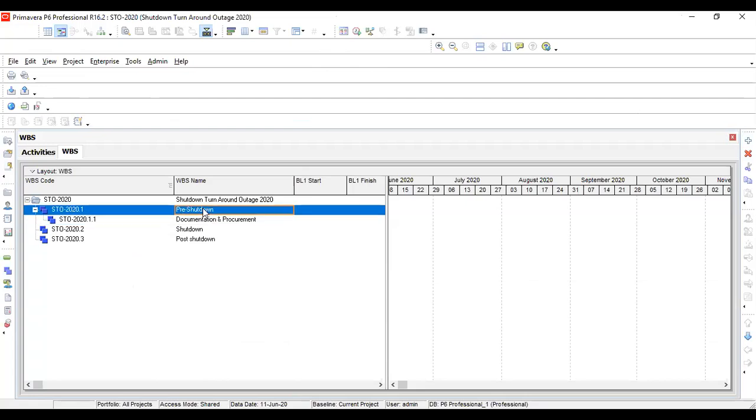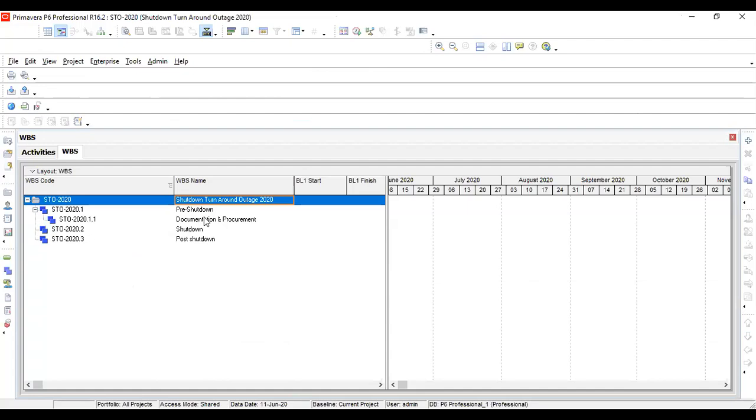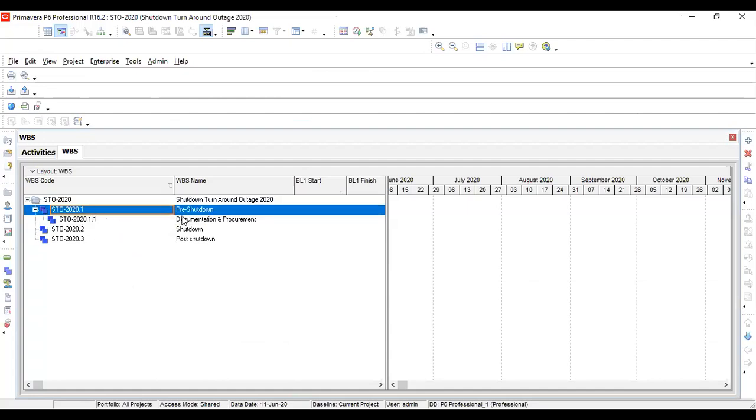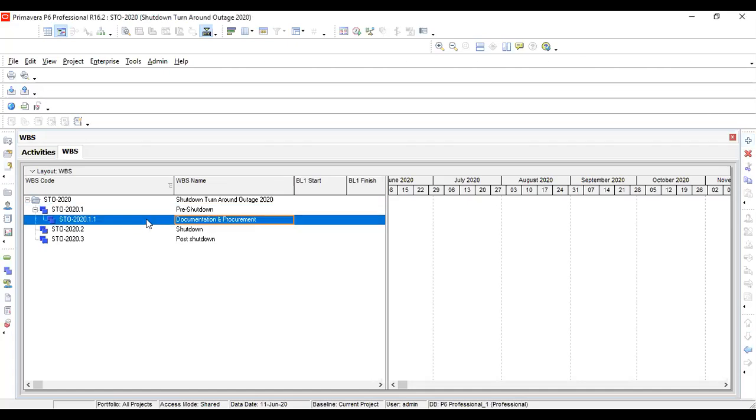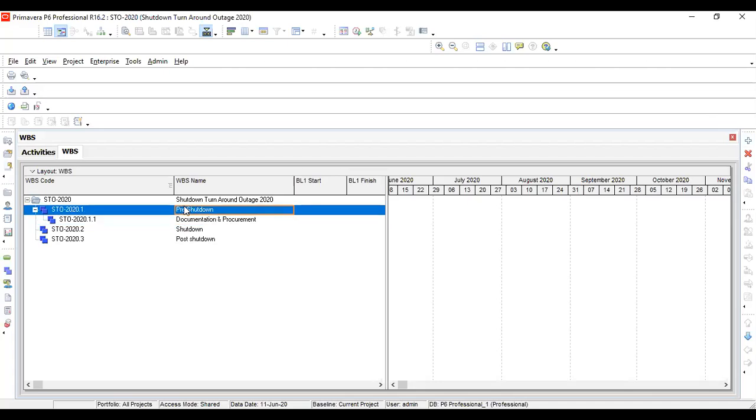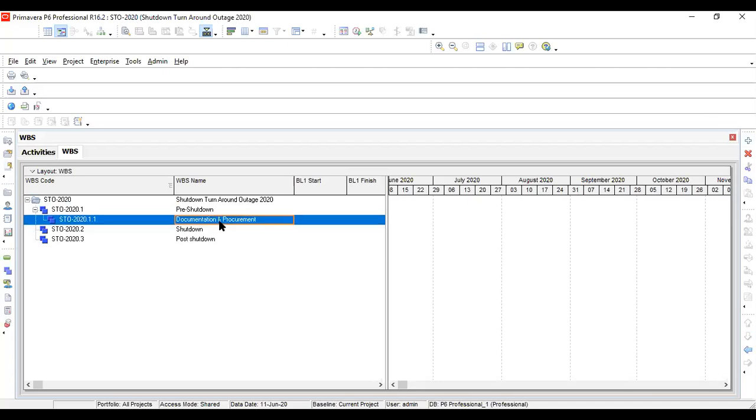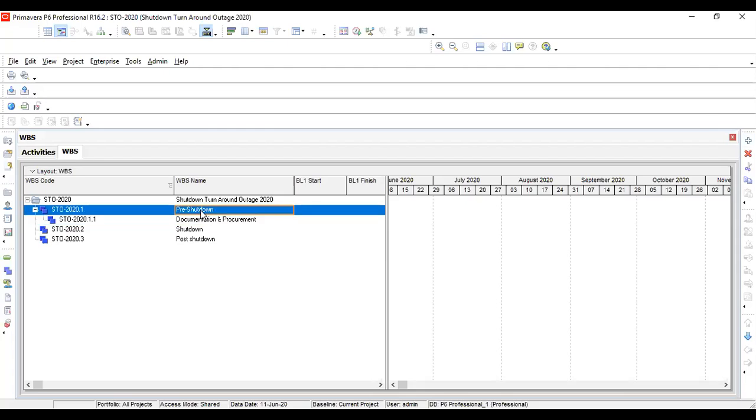So you can see I have subdivided. If I select this one, it would come under this one. Whatever you need to divide, you have to select that one and then click on this add button. That is the way, that is now the second level, because you have divided the first level and what you get is the second level. The sub breakdown of any level will give you one extra level.